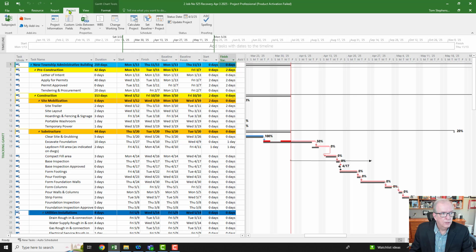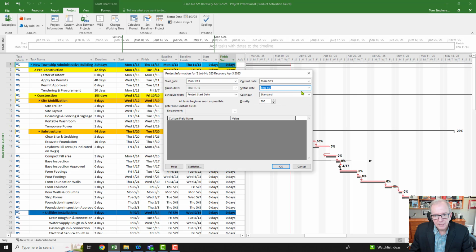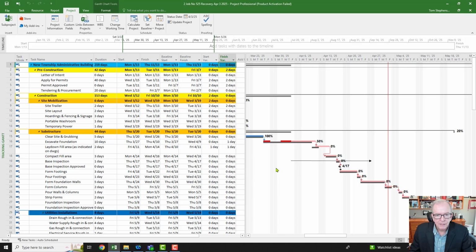So I'm just going to go here. We've got this saved, and I'm going to put in the next status date. In this case, the next status date that I want to put in, April 24th is what I had. Going ahead, maybe I only went ahead 3 weeks. Okay, so we'll go to the 24th. Actually, let's go to May 1st. May 1st, that'll be 4 weeks. Okay, so May 1st, I'm going to click OK. All right, May 1st moves the status date, right?